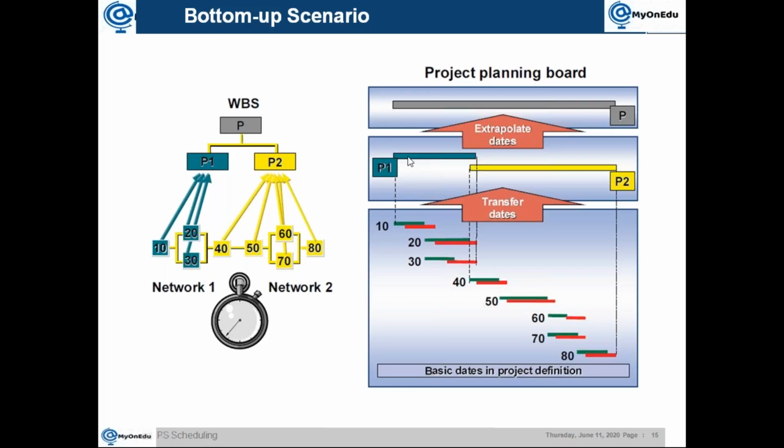So in most of the cases, especially construction projects and those kinds of things, normally use bottom-up scenarios, because that is the best option. You can first list down all the tasks or list of activities required to execute the project. Then from that you decide what total date or duration is required for that project.